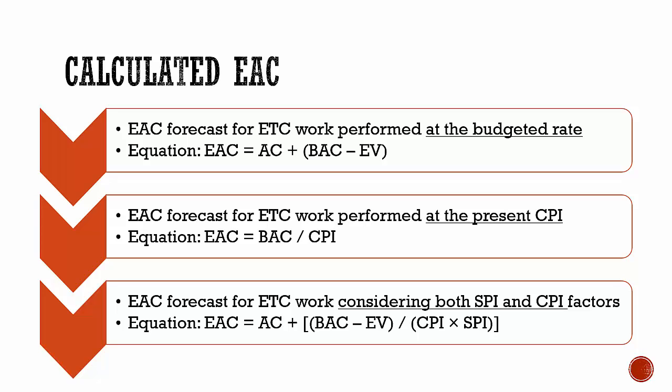The second EAC forecast assumes that the ETC work will be performed at the present CPI. What the project has experienced till now, it will be expected to continue in the future. The ETC work is assumed to be performed at the same cumulative cost performance index as till today.